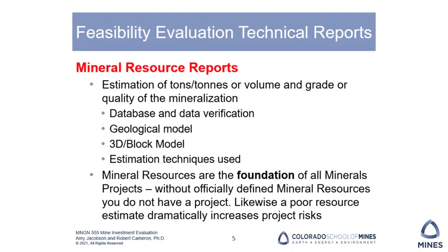Mineral resources are important because these are the foundation of all mineral projects. Without officially defined mineral resources, you do not have a project. Likewise, a poor resource estimate dramatically increases the project risk.